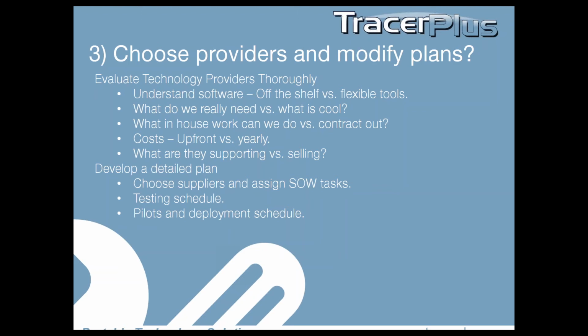We often hear from customers who have bought hardware from resellers, and they don't even really understand what they bought. They bought the hardware before they even had a software package, and they have services wrapped in that the software provider is going to do. And they already paid the bill, and they have a contract in place for 3 years for doing something that the software provider is going to do. So again, don't get in the game until you understand everything going on with the software and hardware providers.